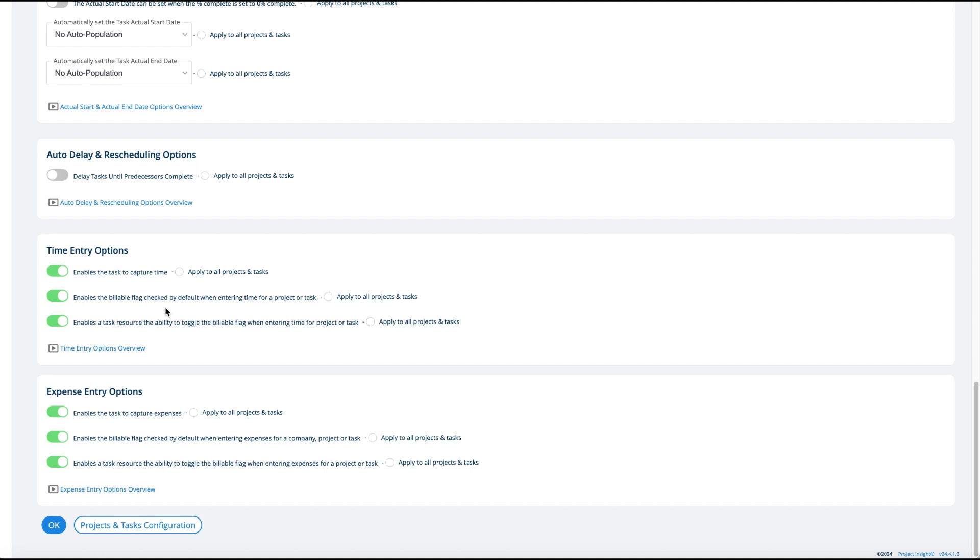So if you're always doing billable time for a client, generally you have this billable flag turned on. But maybe you don't do that often, then you turn it off. Again, this only matters if you're using billable and actual time entries. This third one is whether or not the user can actually toggle billable or not.